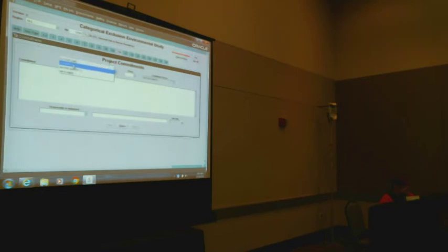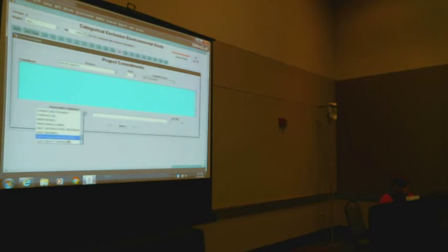Is it floodplains, water quality, or wetlands? And then what phase, whether it's construction, maintenance, preliminary engineering, and then you type in your commitment, whatever it is: we need to avoid this area, or we need these extra BMPs, whatever is different than what would be standard for that project. You click who's responsible, whether it's the contractor or the landscape architect, and the due date, and then you just hit return, and it'll automatically save that.